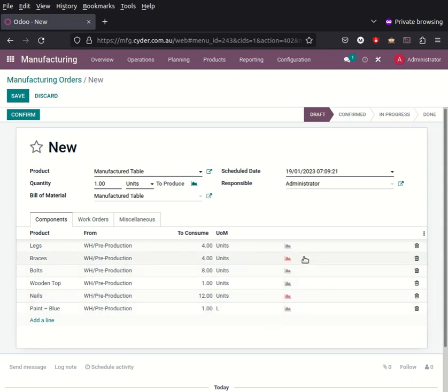Or you may decide that from a scheduling point of view, no, I'm not going to even start this until I've got all the components. I think in the world of caravans and the world of reality, it's unlikely you're going to have all the components you need exactly when you want them, so you can't hold up production. But you just need to be cognizant of the need to coordinate that these missing parts turn up in time, or you can do it anyway. As a scheduler, that's your job, to make sure you coordinate all these things.